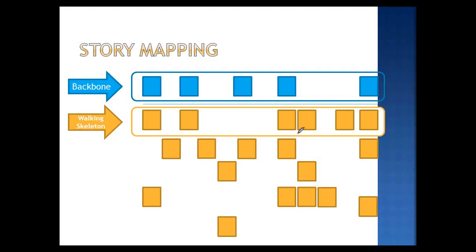So in that case, I would drop this down here, right? And because buying alcohol at the grocery store is a high value to the business product, I would include that in my minimally viable product. So that's one thing I want to release first, right? One thing I want to get out quickly. So I would include that one because it's got a high gross margin on it and allows me to make a lot of money as a company.